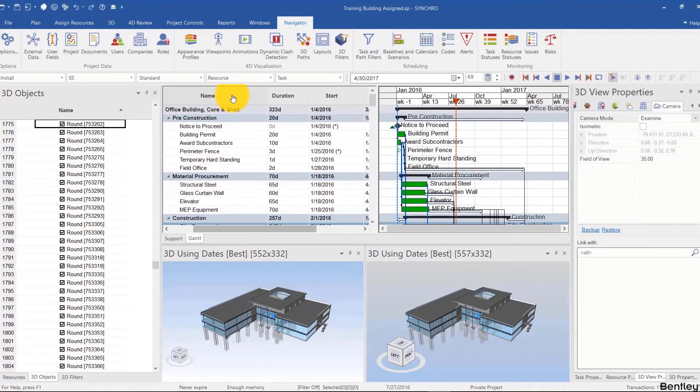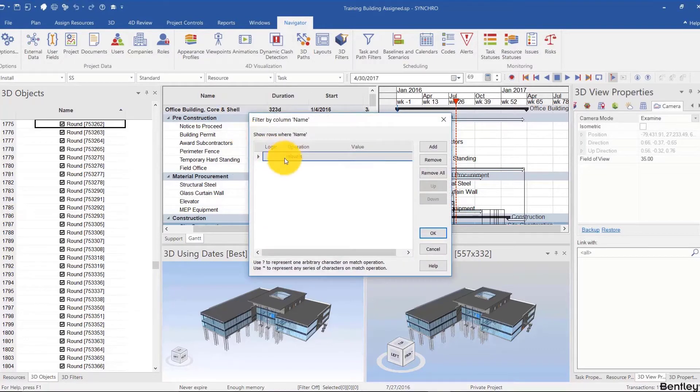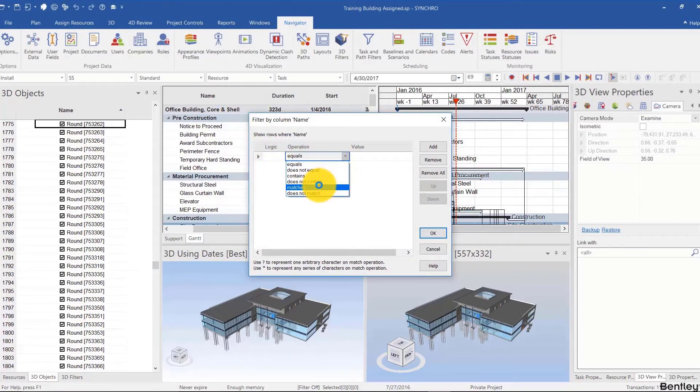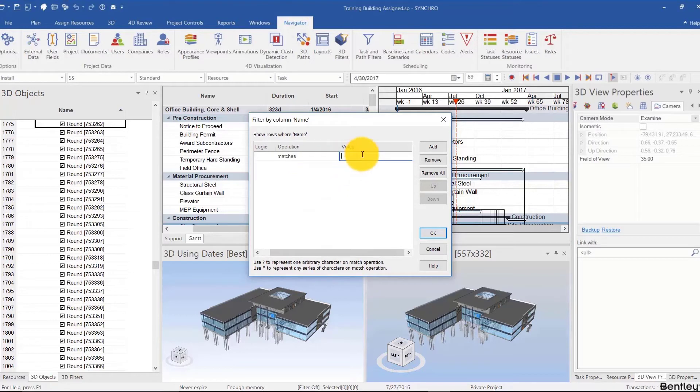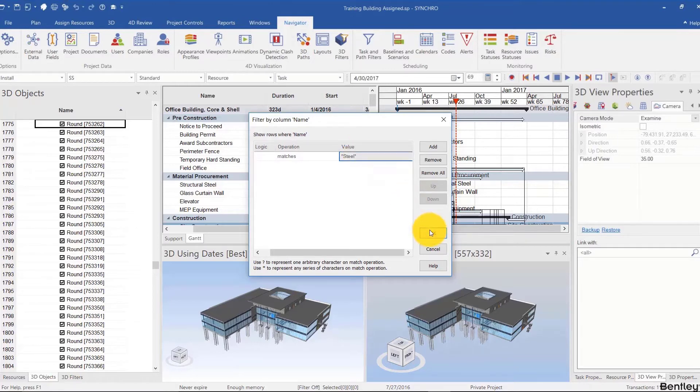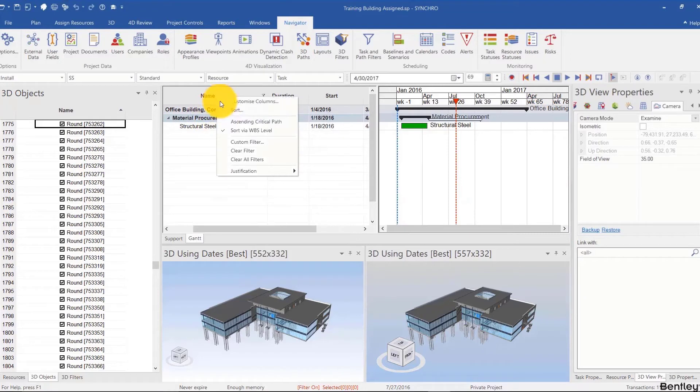You can also filter. I can right-click, custom filter, and then use wildcards that we talked about earlier. I'm going to do matches star steel star and hit OK, and we only have one activity.